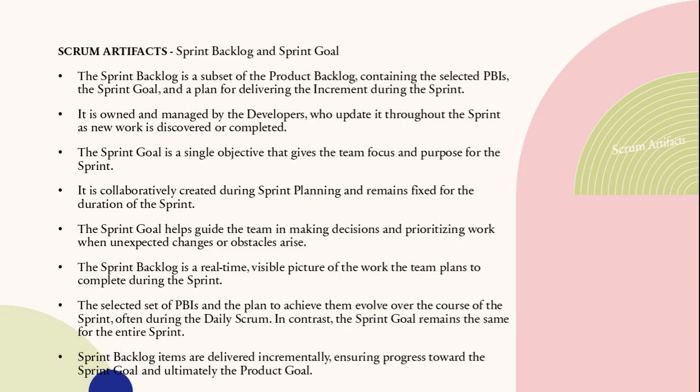The sprint goal is a single, focused objective set during sprint planning. It stays fixed throughout the sprint, giving purpose and guiding decisions when challenges arise. While the backlog may evolve, the sprint goal does not.